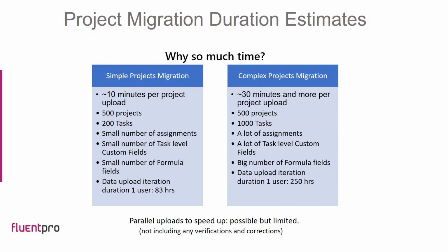It can take even an hour or more to upload such a project to Project Online. There are ways to perform parallel uploads to speed up the process. This is possible, but in some ways limited, and these limitations are related to the nature of Project Online and to the API provided by Microsoft.